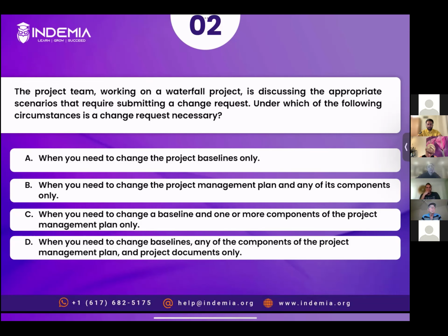And we have some plans like we have discussed in the course: scope management plan, cost management plan, quality management plan. So these 9 or 10 subsidiary plans, then other components like governance plan, change management plan, configuration management plan. So whenever you need to update or upgrade a baseline and any of the components of the project management plan, you need a change request. But you don't need any change request when you are updating a document.